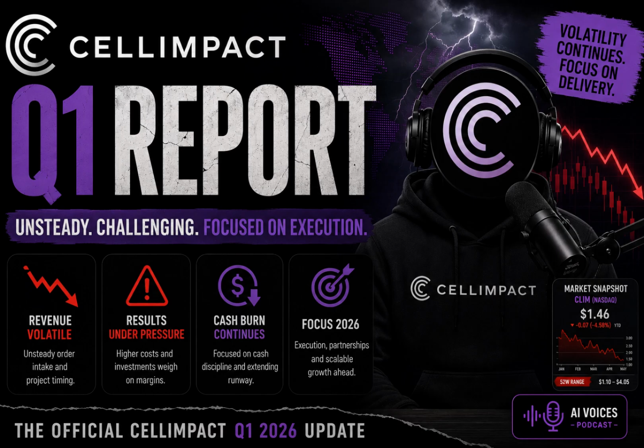And the report blames this on a lack of clarity regarding policy directions, changing governmental support systems, adjusting regulatory frameworks. It's like the ultimate infrastructure chicken and egg scenario. Totally. Like, I'm not going to authorize a $300 million electrolyzer facility if I don't know exactly what the government subsidies or the tax credits are going to look like next fiscal year. You can't. The financial modeling for these massive projects completely relies on those regulatory frameworks being locked in. And when those frameworks are delayed, the entire supply chain freezes. You don't buy millions of flow plates for a facility you haven't even started building yet.